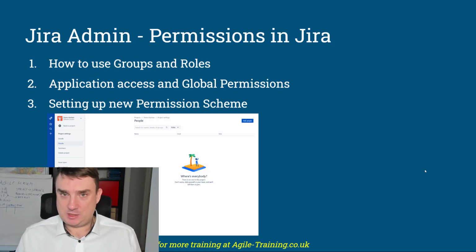Roles were added later, I think around version 4, 5 or maybe even 6. Roles are basically like an additional filter, a layer. I'm going to paste an article so you can read the difference. But if you really want to use Jira like a pro, you should start using roles and groups. Do not base project permissions on a single user, because it will be impossible to lock access for that person.